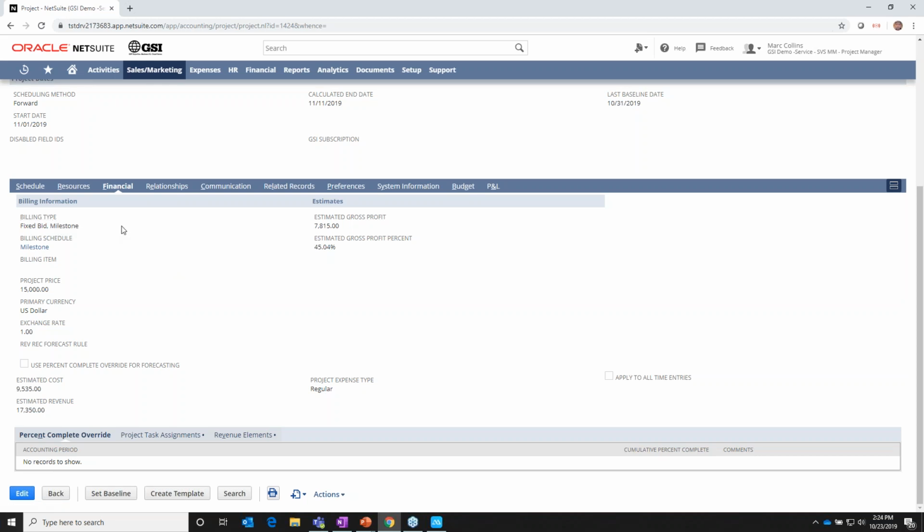Specifically this billing type. NetSuite will allow you to do four primary billing types. There is time and material, so basically a charge based on actuals. There's a fixed fee, and generic, just a fixed fee milestone that's based on the achievement of milestone tasks, and a fixed fee interval, which is based on some cycle. You can additionally customize and create your own billing types, but generally between those three or four methodologies, you have the capability to achieve any type of billing that you need to do.